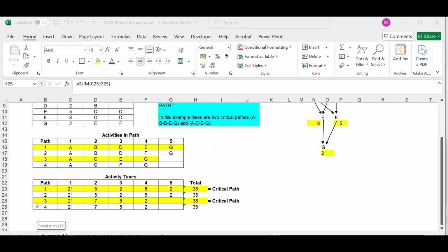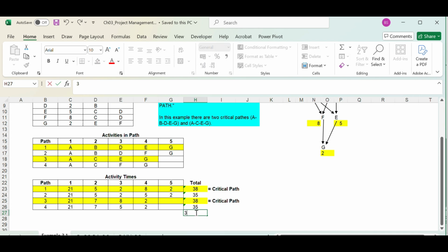So now we had another path here, and it was taking time like 37 minutes. It took 37 minutes for another path to complete. See, now this 37 minutes will be called as near critical path. The allowable delay is close to that of the critical path. The path whose allowable delay is close to that of the critical path is called a near critical path.